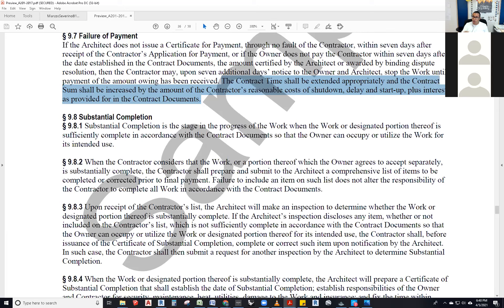Another good sign that a project is substantially complete is that you could actually get a certificate of occupancy — meaning you could have passed, or already passed, all inspections: plumbing, framing, insulation, electrical, finished electrical, finished plumbing, rough plumbing, rough framing, fire protection — all of them. That's when you can actually use the project for its intended purpose. If a railing is missing on a stair, you would not be substantially complete, because it's not safe — it's violating code and won't pass inspection.